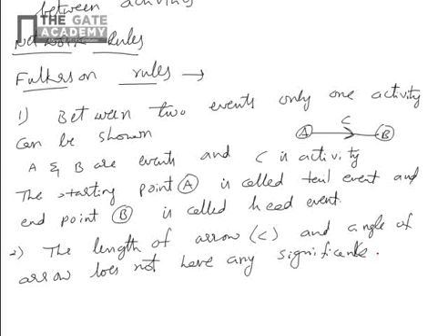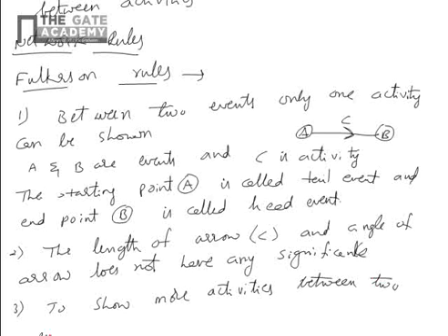Between two events, only one activity is shown. If more than one activity is to be shown between two events, dummies have to be used.